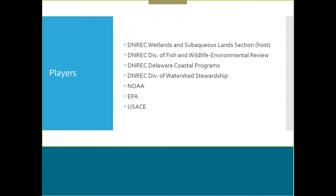Most of these projects are within a waterway, so a lot of times I'll be reaching out to the fisheries biologists, and we're also concerned with important commercial and recreational fisheries resources. So I review the project with regards to those species and the impacts on those species. And then usually we make a determination whether or not the project will have to have a time of year restriction with regards to those important species. So we'll go, well, I think we'll probably cover that more.